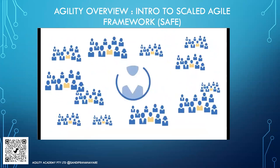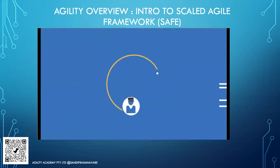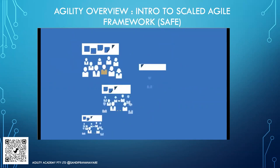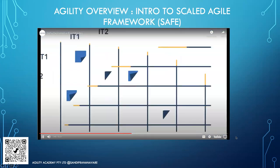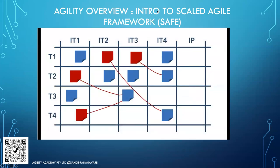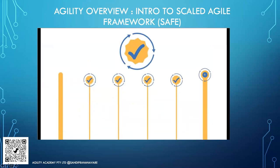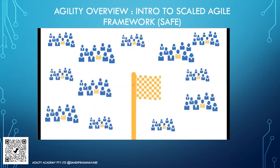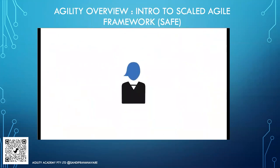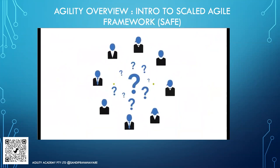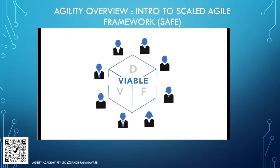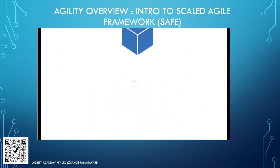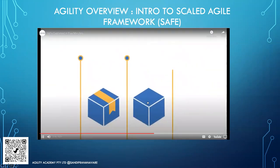PI Planning is facilitated by the Release Train Engineer, who serves as the ART's coach. Product Management provides vision and backlog; the System Architect provides architectural guidance. Teams plan the PI, identifying deliverables, and a program board visualizes dependencies. Each iteration, the ART demos the integrated solution in a system demo, and at PI end all teams retrospect in an Inspect and Adapt event. Product Managers use design thinking to understand customer problems and discover solutions that are desirable, viable, feasible, and sustainable. The ART builds a continuous delivery pipeline using DevOps practices to release on demand.